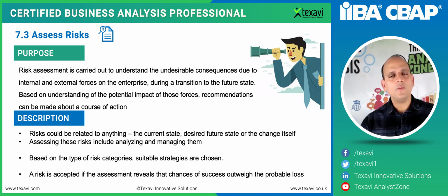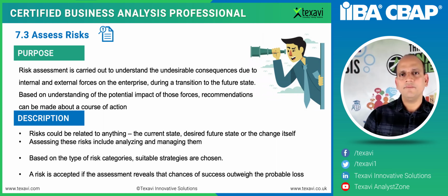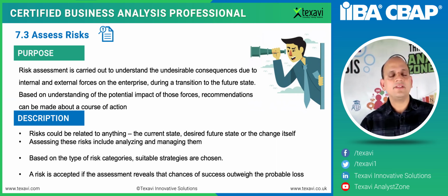So it's all about how we can identify the risk early enough so that we can take action, and we are prepared enough to react. As we discussed, there could be three types of reaction or mitigation. One is you can avert the risk, which means you can try and just avoid that risk. And then the third one is basically you can try and accept. You can't do anything. You can neither avert nor avoid. You've just got to accept the risk and then move on. So depending on the type of risk, the potential impact, and how you're going to structure the response, you can do any one of those three different mitigation actions.